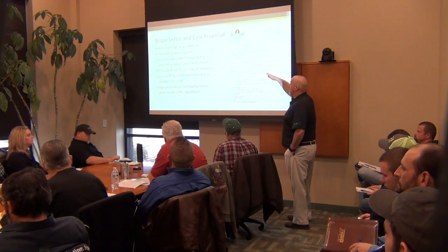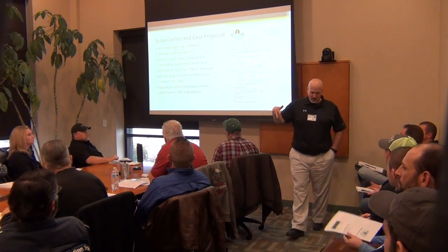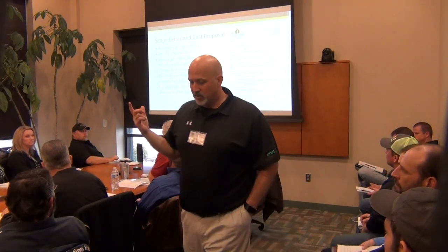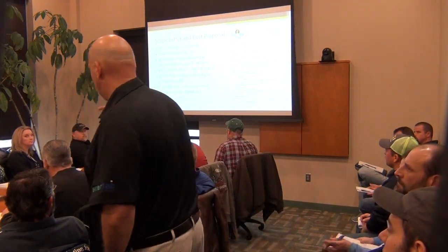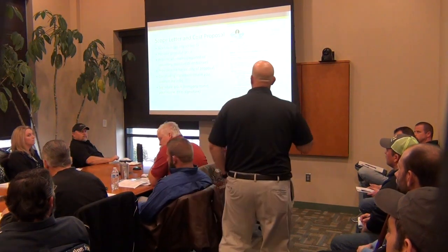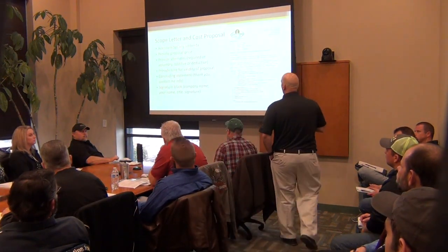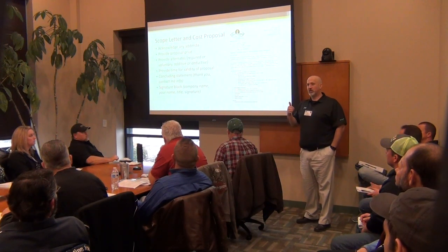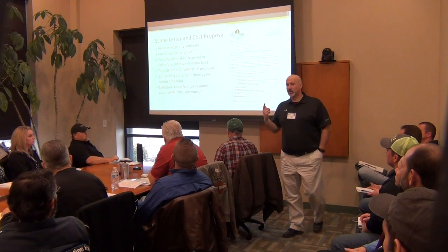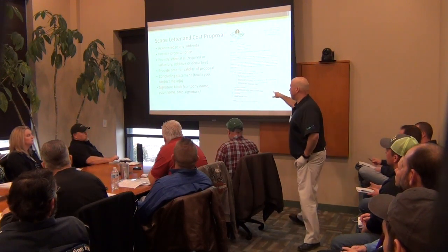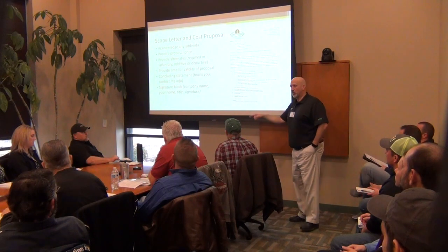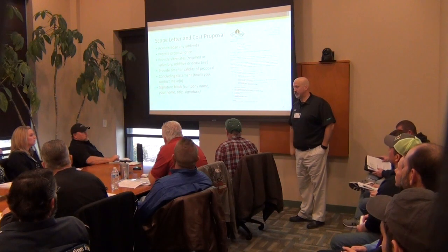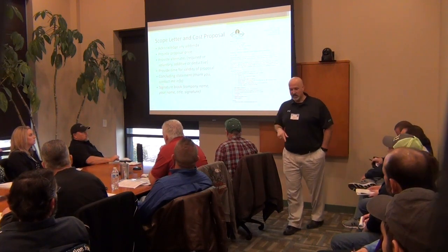Okay? Well, I got off track there. What I was going to say was we had two sub numbers on a painting scope. They're 60 grand apart, and one of our estimators said, well, I feel more comfortable with this guy. I'm like, well, why? For 60 grand more, why? And he went through it, and we agreed. So we're going to increase our price 60 grand because it's the right thing to do, because that guy has the best scope letter, right? We feel more comfortable with that subcontractor.